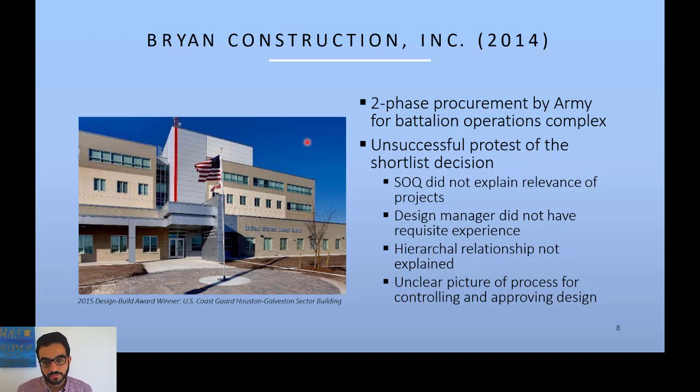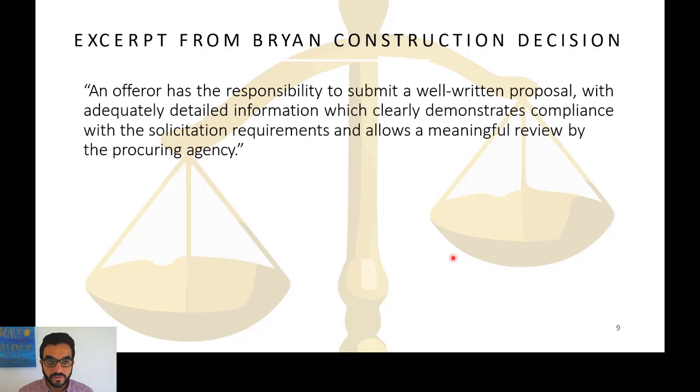The RFQ response, the statement of qualification, coming from the design build team responding to the RFQ, did not explain the relevance of projects. So they skipped one of the requirements. And they also skipped another one, which is the experience of a design manager, and the relationship structure was not shared or explained. So there are gaps in their proposal, and that led to them losing the RFQ submission, and they were not moved into the next phase.